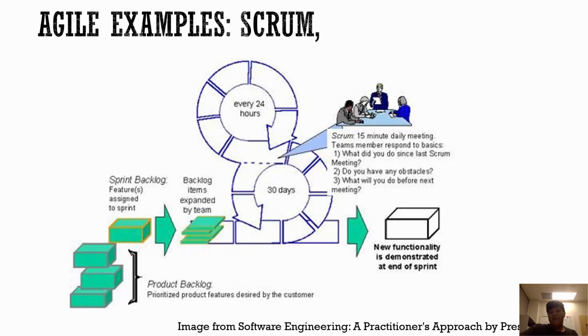A sprint may take a couple of weeks, and your team is going to be assigned different items from that backlog, with different people assigned based on their capabilities and what is needed. And then they have this couple of weeks to go through and work through this. Actually, let me make a little correction here. We have the sprint backlog of the features we're committed to for this little 3 weeks we're going to spend working really hard on our product.